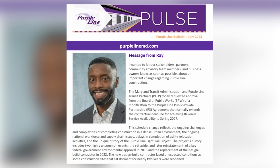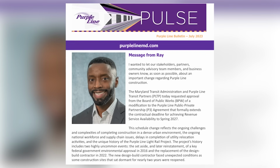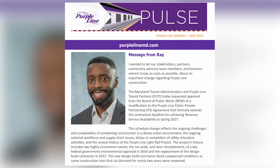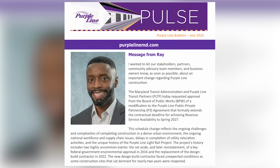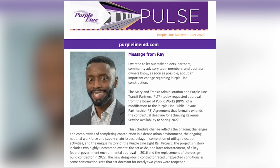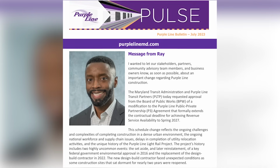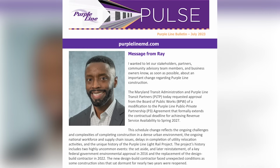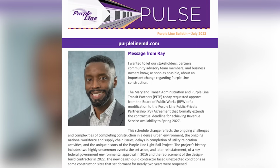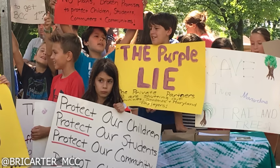The Maryland Transit Administration's July 2023 press release highlights several contributing factors: delays in utility relocation activities, the complexities of completing construction in a dense urban environment with significant pedestrian and vehicular traffic, ongoing national workforce and supply chain issues, and the project's unique history. Additionally, the replacement of the design-build contractor in 2022 that we discussed before led to a nearly 2-year construction halt, further delaying progress.